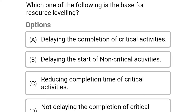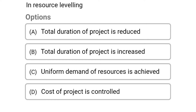Next question: which one of the following is the base for resource leveling? Option A: delaying the completion of critical activities, option B: delaying the start of non-critical activities, option C: reducing completion time of critical activities, option D: not delaying the completion of critical activities. The correct answer is option B: delaying the start of non-critical activities.